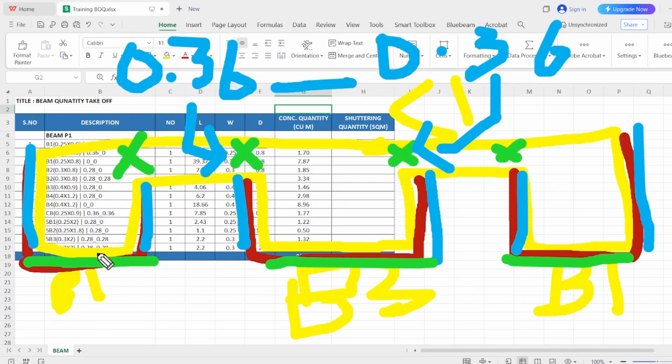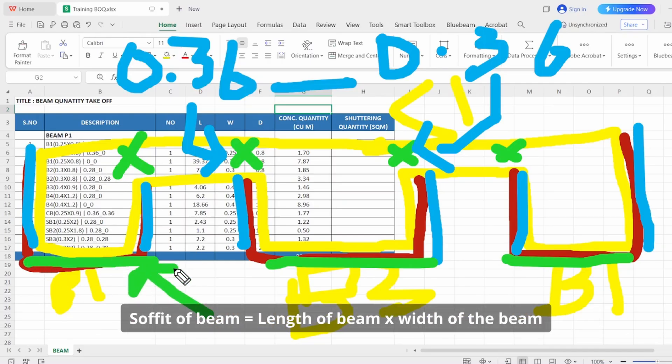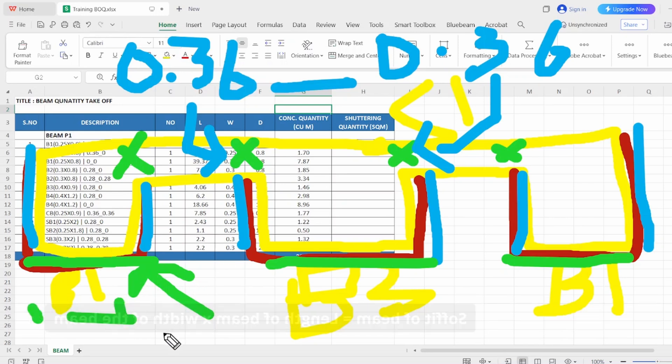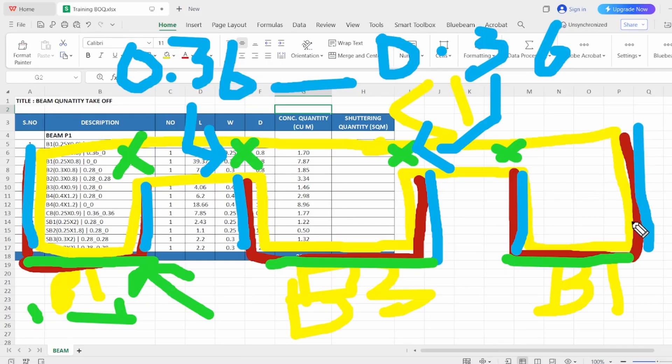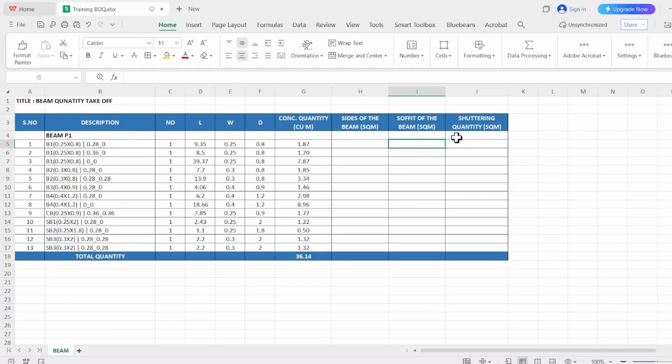For the green area, which is the soffit area, we just need the width of the beam multiplied by its length. Now I'm going to explain how to calculate sides of the beam. Let's open two columns. OK, first let's do the easy part—that's the soffit of the beam. Soffit is nothing but length of the beam multiplied by the width of the beam.